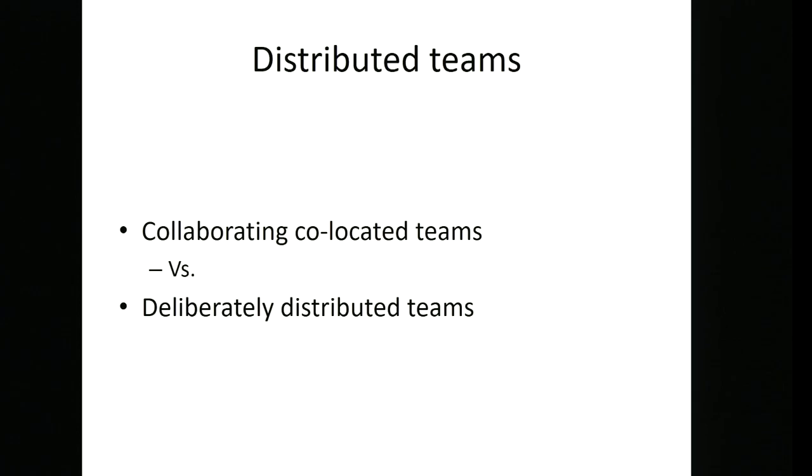And so you don't have anything which is developed in just one place. This might have advantages for things like localization of a product, though. So the best place to localize something for right to left text, for example, might be in a country where people use right to left text. So that might be a strategic reason to do that. But we'll talk about different ways of doing it now.